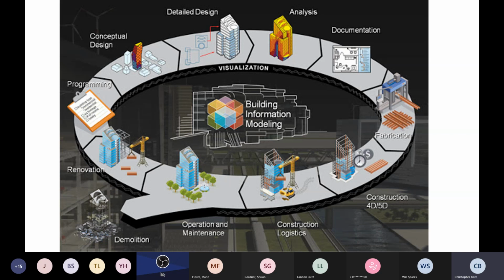I would say on our more recent projects, we're doing it most of the time, and the level of integration is changing. The traditional way is to take individual activities in a construction schedule, and then tie them to elements, and then say, okay, what is this activity doing to this element? Is it constructing it? Is it a temporary element? Is it demolishing it? That's been done in Navisworks for a long time, and I think the next level of sophistication of that is